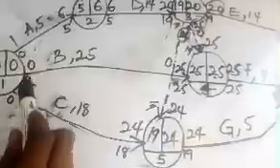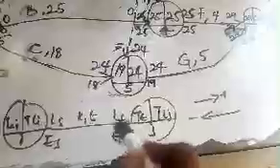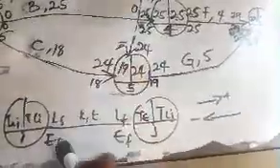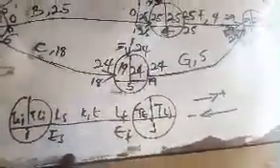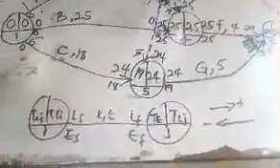That is when we have our ES, we have our EF, we have our LS minus ES equals 0, and our LF minus EF equals 0. I told you the formula to calculate the time, you check. And what is the formula? It's very easy.